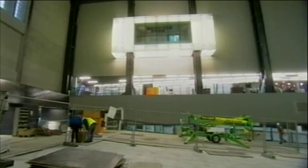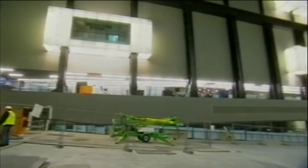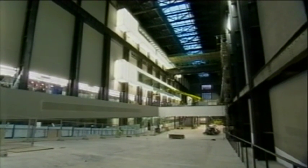The turbine hall finally has its clouds of light, 9 months later than planned, and at an additional cost of £250,000. But there is one final nasty surprise. It is still possible to see the light tubes at the ends of the light boxes, a phenomenon Michael Casey has difficulty explaining, but he tries.